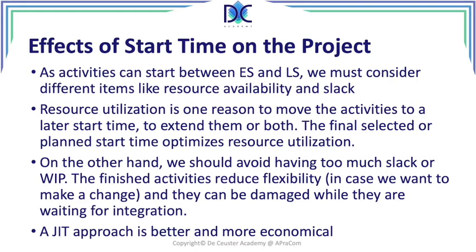Just-in-time means that we only start on the activities when we have to start. So when we plan a new activity and we know when we need the part, we're basically planning backwards to say, okay, we need the part at this time. So when do we have to start working on that part? It's typically what we do in a Kaizen environment, just-in-time environment, or just-in-schedule environment.